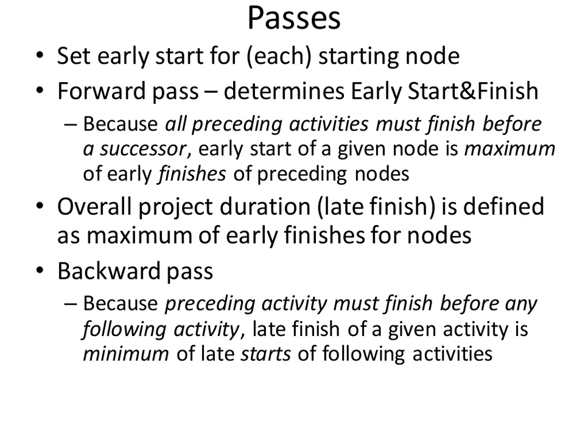And finally, and this will be key as you do this on the exam, it's this notion of are you taking a maximum or a minimum here, okay? And we're going to see that this unpacks in a familiar way. In the forward pass, you're taking a maximum of the early finishes. All of the things on which you depend have to be finished before you can start. Can't start till each and every one of the things that you're depending on is finished.